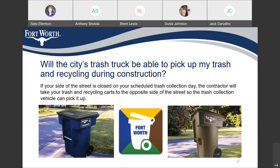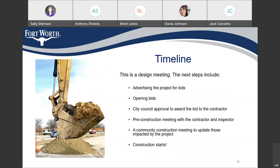Will the city's trash truck be able to pick up my trash and recycling during construction? If your side of the street is closed on your scheduled trash collection day, the contractor will take your trash and recycling carts to the opposite side of the street so the trash collection vehicle can pick it up. Timeline: this is a design meeting. The next steps include advertising the project for bids, opening bids, city council approval to award the bid to the contractor, pre-construction meeting with the contractor and inspector, and a community construction meeting to update those impacted by the project before construction starts.